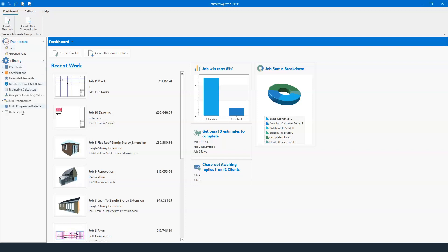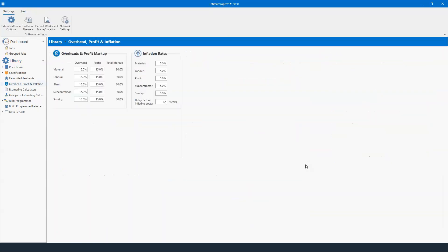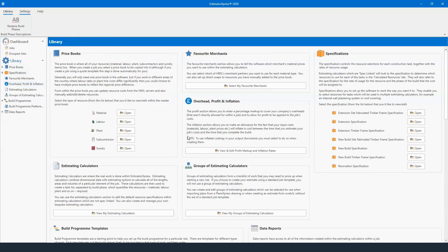Over on the left-hand side you have your library. You can click the drop-down box so everything is nice and neat on the left-hand side, or you can click the word library and it spreads everything across the screen. In the middle you've got your overhead, profit, and inflation — click this button and you'll be able to put the percentages on top of your material, your labor, your plant, your subcontractor, and your sundry items. You've also got the option there for inflation rates at the very end of a job.